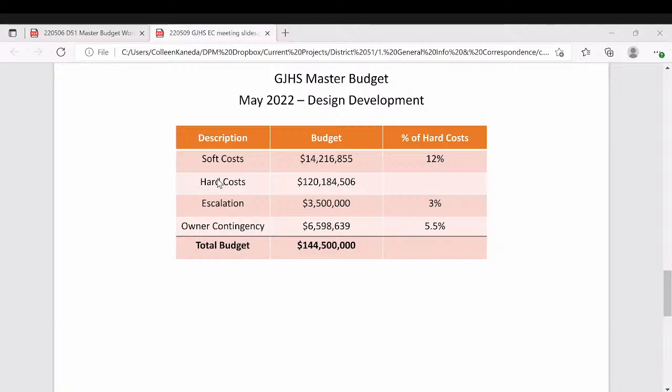And then the risk, we bookend some risk on this project because we have to get out of the soils first. But then at the end of the project is when we get into the abatement that we don't know. And then whatever soil conditions are underneath the existing school that we have to turn into fields and parking lot, there's some risk there. So we won't let you all spend all the money before the building's knocked down. We're going to try to always save money through even the end of the project in case we run into some soil issues underneath the existing school. But it's pretty typical on a school replacement project when we're building a new school on the same campus that we're going to have that risk. And so we continue to hold back money for that at the end.